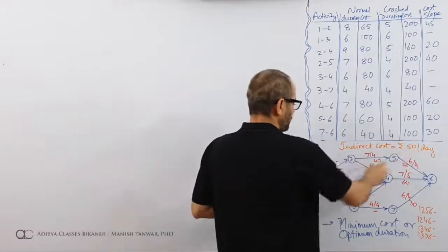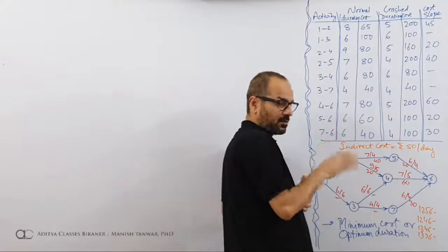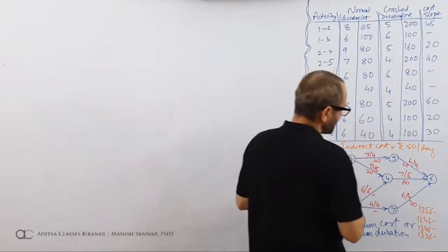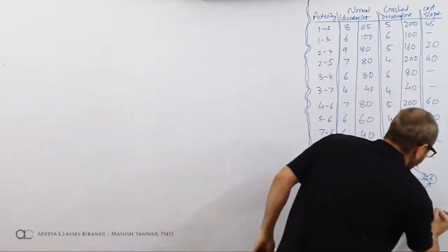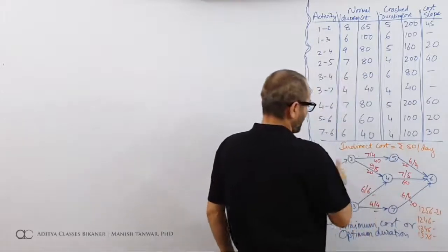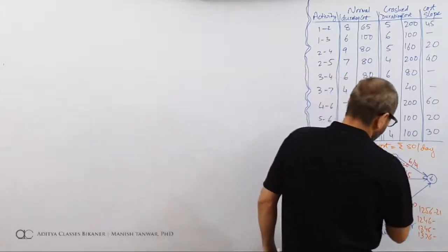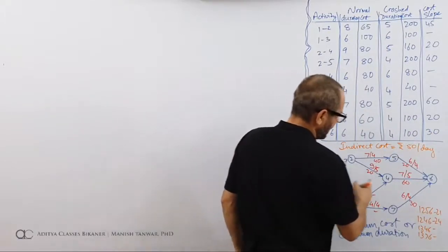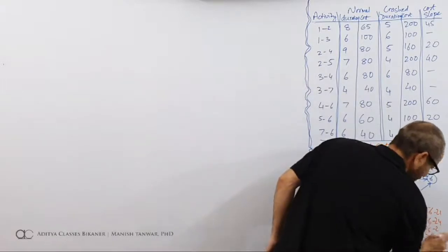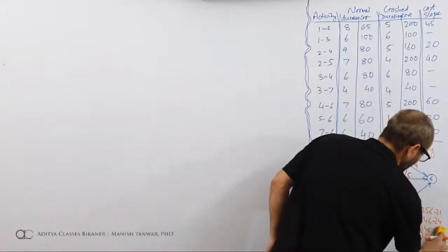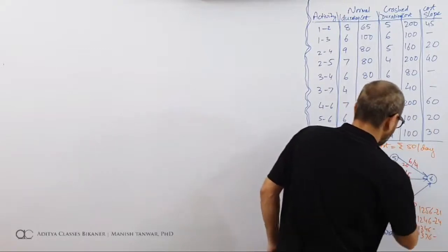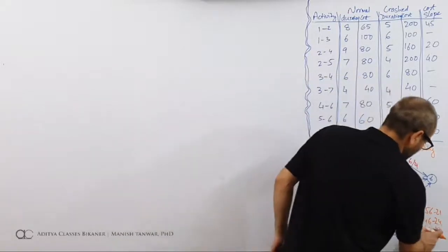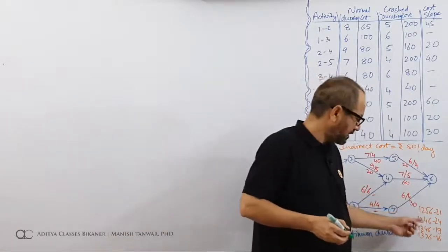What are the durations of 1, 2, 5, 6? Right now it is being done normally. So the duration would be 8, 7 and 6. 8 and 7, 15 and 6, 21. Right now the duration is 21. For the next, 8 and 9, 17, 17 and 7, 24. Then for the next path we have 6, 18, 25, 6, 18, 50. It will be 6, 12, 19. Then there is 6 and 4, 10, 10 and 6, 16.